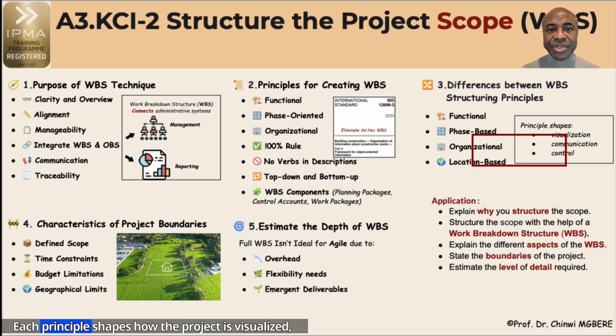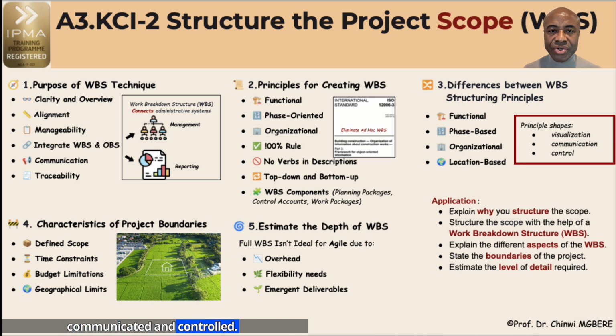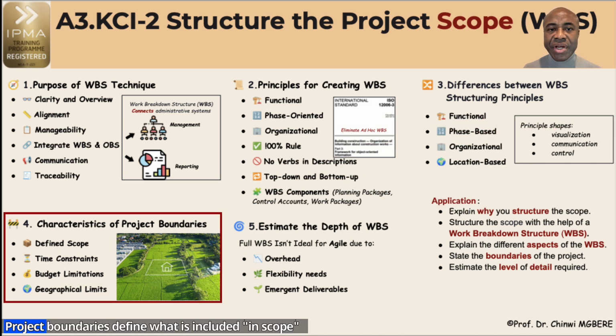Each principle shapes how the project is visualized, communicated, and controlled. Choose the structuring principle that best aligns with your management, control, and reporting needs. Project boundaries define what is included in scope and what is excluded out of scope. Using a work breakdown structure helps clearly establish and communicate these boundaries, ensuring a shared understanding among stakeholders and preventing scope creep.